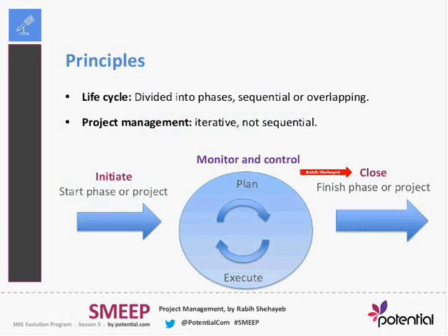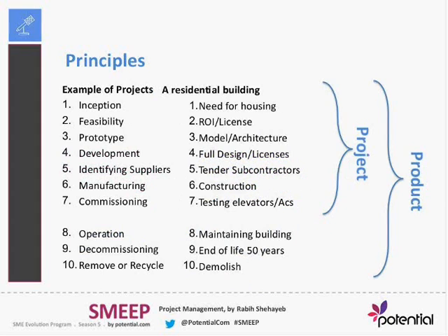We will look into the life cycle of project and the product. These are just quick examples that show you how we can divide the project into different phases. So here we're giving an example of a residential building, where it starts with the phase of inception, which is the need of housing, and then we go into the feasibility, prototyping, the development, identifying the suppliers, manufacturing, and commissioning.